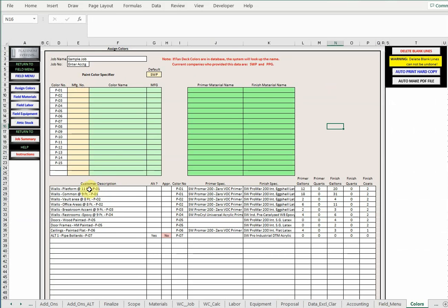It shows you a list of all the things that we have done on our takeoff, and you'll notice the last 4 digits of each line item has P01, P02, P03, P04 in this format. This was in the PlanSwift training video. Make sure you end with the color used. If you do not have those entered at the time of estimating, you can always enter them later at this point. Now, what color do we want to use for P01?